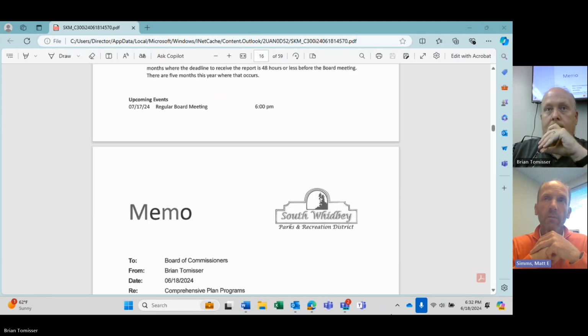So, even with that personnel transition, it seems like their team was picking up okay. They've now given us some responses to some of the things that we had asked about, changes, and have also offered to set up some follow-on meetings between us directly with some of the subcontractors, including the aquatic subcontractor, who's this company ADG out of San Diego, and the HVAC subcontractor. I can't remember their name. Brian, you may know their name, but it's a chance for us to address some of the concerns we had with the HVAC system based on some lessons learned from those other facilities, particularly Rainier Beach. Rainier Beach was designed by ARC and this same HVAC subcontractor, and Rainier Beach has had some struggles with temperature control in that building.